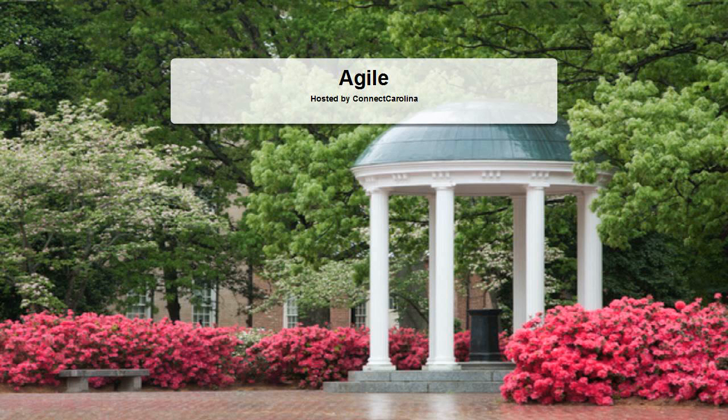When you start seeing this, and it may be more than 3, backlogs. One of the big goals of having this board is that it is a diagnostic tool. And when you see large stacks in a queue, why? What can we do to fix that? Why did it happen? Did we have a change, a new team member in the development and they're still coming up to speed? Or maybe they're more junior and so they're somewhat less productive than the prior person was? So maybe we need to do a readjustment of our WIP limit. Why? And what do we do to fix it?